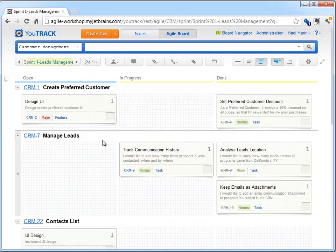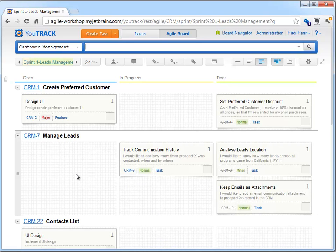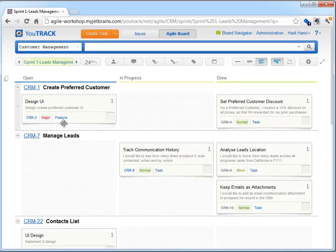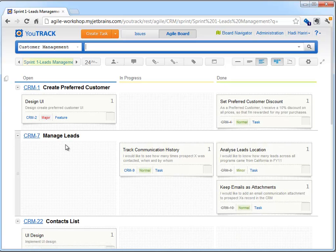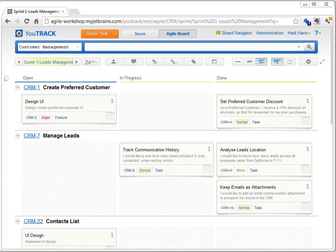An important concept to understand about how the Agile boards work in YouTrack is that of swim lanes. In essence, a swim lane is a horizontal lane across the board that can contain one or more tasks. By default, a swim lane is mapped to the field type of an issue and value feature. Basically, this means that each swim lane represents a feature or story on the board, which in itself can be composed of multiple tasks. The correspondence between swim lanes and issues of type feature works well for most scenarios, although it is configurable if you need to make a different mapping.